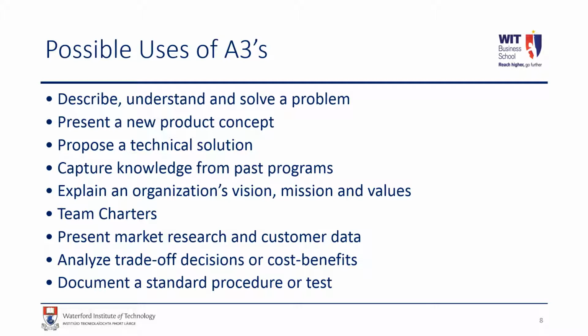It can also present team charters. So you have a process improvement team that's designed to tackle a particular issue with a process or an improvement opportunity with a process, and it can present the team charter. So who's involved, what their role is, what the implementation timeline is for the project, how the project's going to communicate, how it's going to go about achieving its goals, etc.